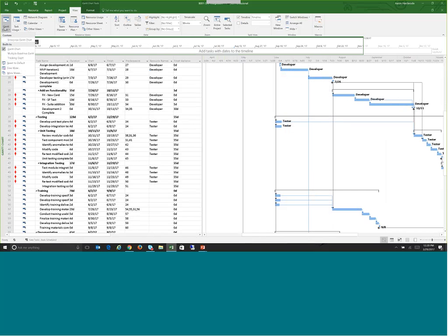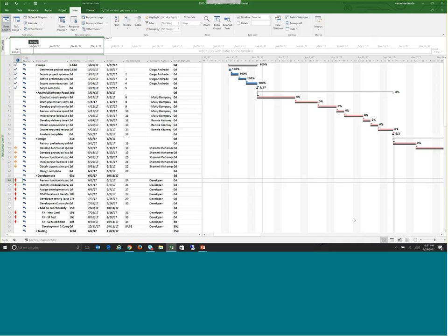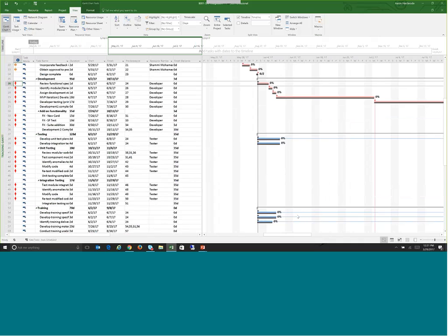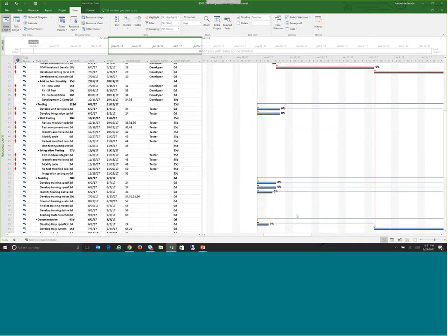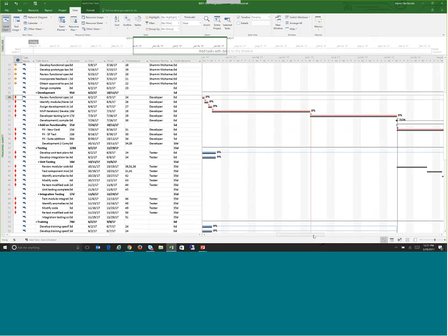Now, there are a couple options here. I can also select a tracking Gantt, which will show me how I'm tracking against the baseline. Again, it is just going to show against baseline 0. So for any of these, I'm able to see how it's tracked against the original baseline value. What we're seeing here is a gray bar that reflects the current reality, and a blue bar if it's a standard task not on the critical path, and a red bar if it is a task on the critical path. The red and blue reflect the baseline values. Gray reflects where you currently are with that task.